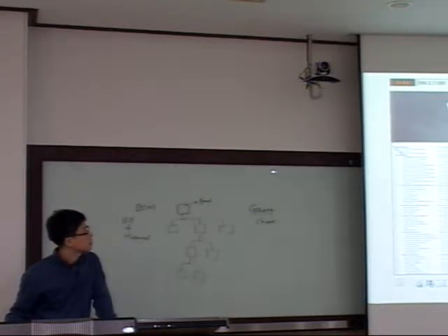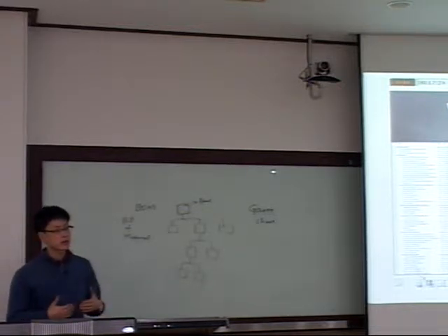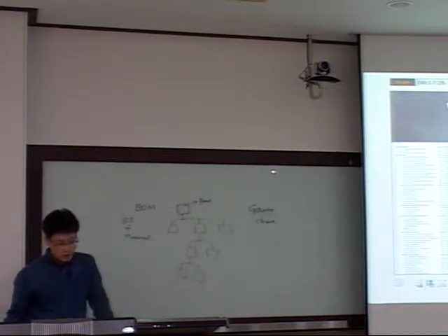The three are subtasks of the first one, and these 1, 2, 3, 4, 5, 6 are also subtasks of this number 2, and there are many other subtasks to this first subtask. So it's hierarchically arranged, and on the right side of that task name there is a starting date, ending date, and the time duration required. And based on that time duration required, the bar lengths are determined.